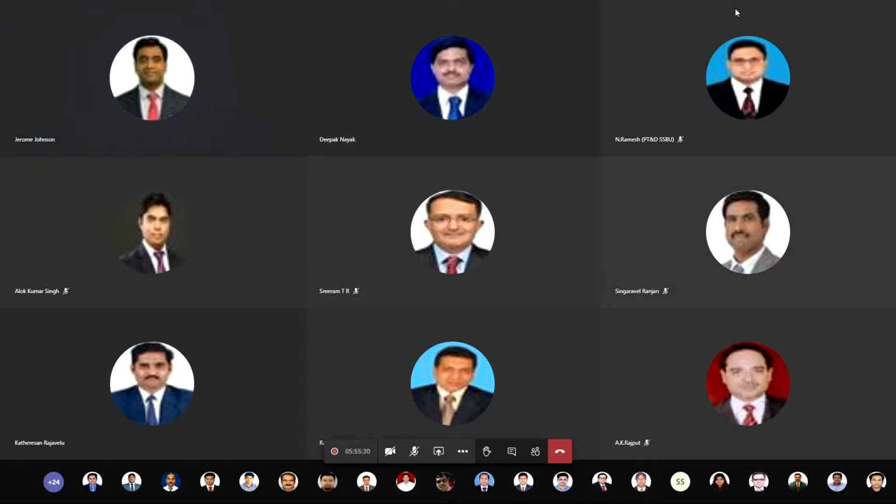So basically one major shift to each substation view was done and may be applicable to all the substations. If you start order finalization after getting the PO in hand, there is no way you can start the site work before 4 to 5 months, because first you will do a techno-commercial evaluation and then place the order. That will take some time, and there is some linkage with the ACE, so giving the order to the vendor takes some more time, and after that the vendor shares the drawing which will be used for the layout preparation. So by the time you start your initial drawing itself, you are already 2 months into the project.